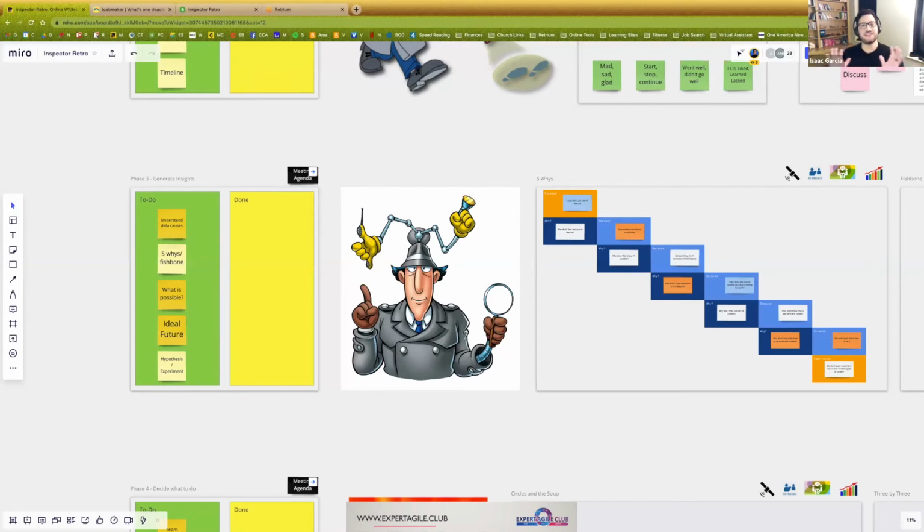Get your team to talk about things that are safe, and then begin to segue that into things that may be more dangerous. Nobody wants to go into a retrospective and feel like they just lost their job because they said something that's going to get them fired. Talking about cats and dogs probably shouldn't get them fired. If they disagree with the CEO of your company, cats over dogs, probably not going to get them fired. So start with safe topics and then try to move them into more real topics. It is okay to use a few of your first retrospectives to try to build up that psychological safety in the team. It's a good investment for you.